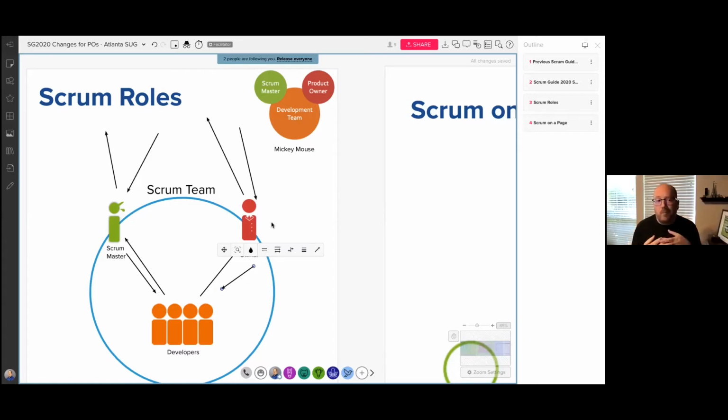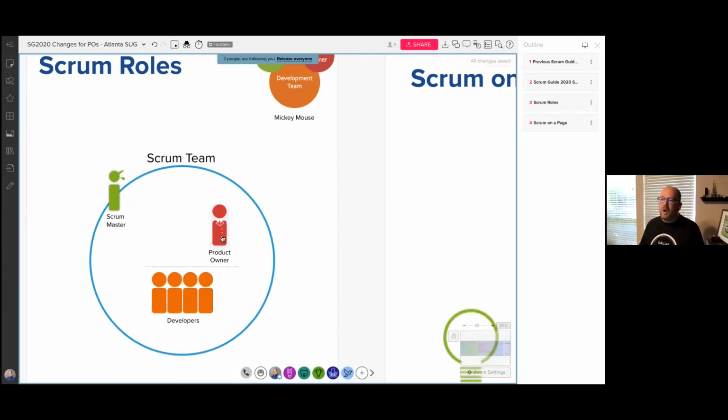Teams that were doing Scrum properly probably didn't see an issue with this. They didn't mind development team members going and talking to customers. But there's a huge faction, we see it with our clients all the time, of this us and them mindset inside of a Scrum team. So the core change here was really about getting rid of these multiple team things and bringing the product owner and the Scrum Master truly into the Scrum team. That's why this change was made. There's no two teams in Scrum. There's one team, one product team focused on the product.